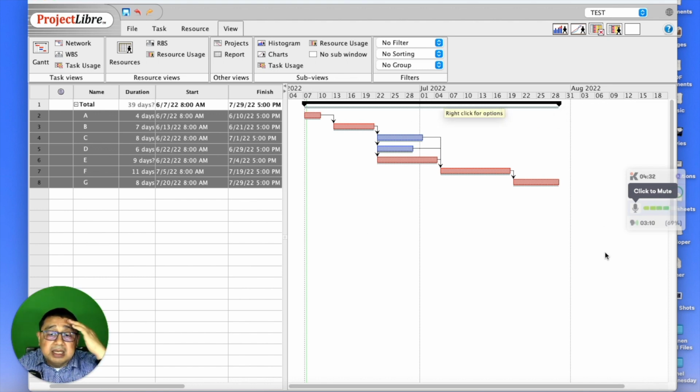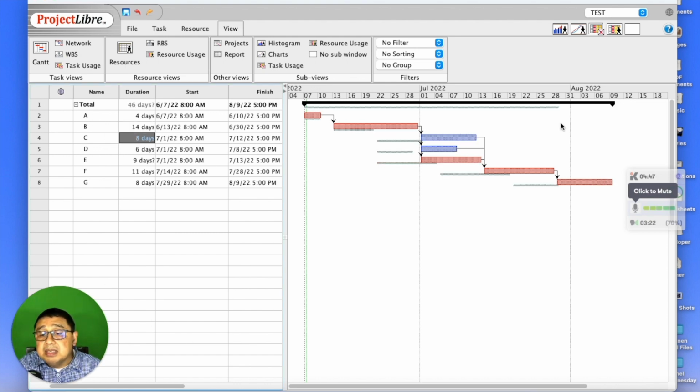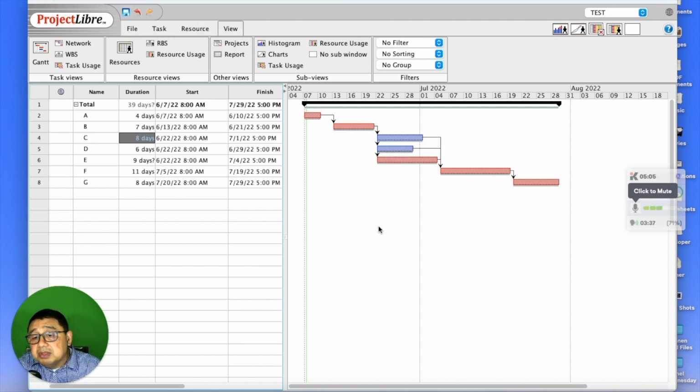If anything changes there, you will see, let's just change 7. Let's say if at some point you make it 14, and all right, you now see the difference in the assumption. So if you changed a specific duration, then you move from the original baseline to the new finish date. So let me just undo that. So that's the benefit of the baseline. So when you undo that, it goes back to the original set of assumptions.